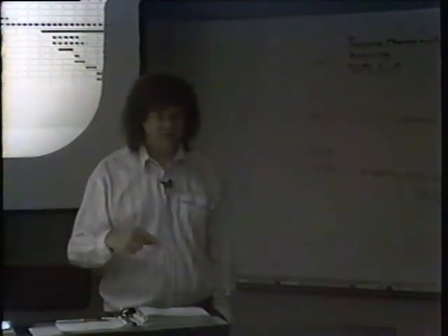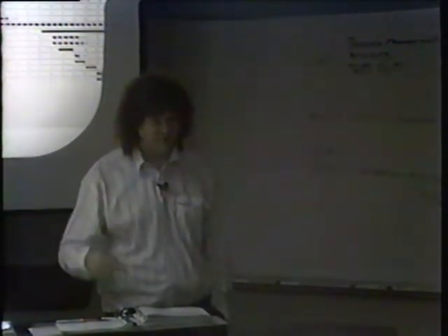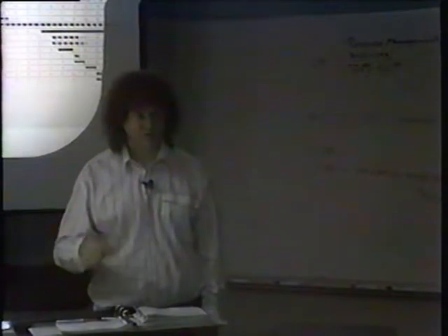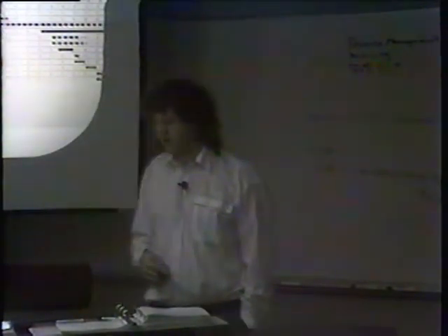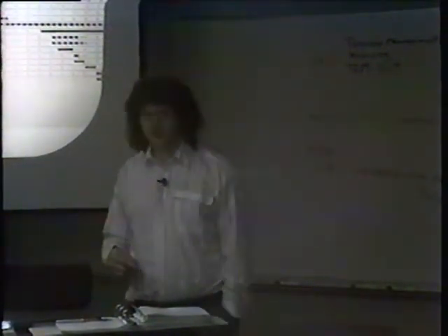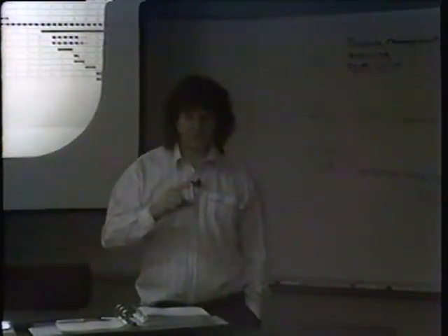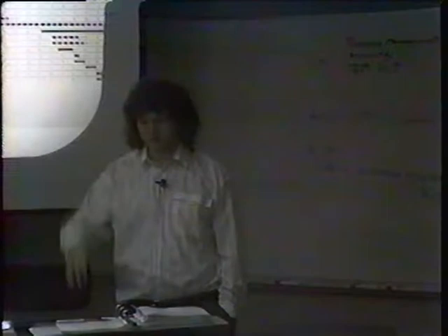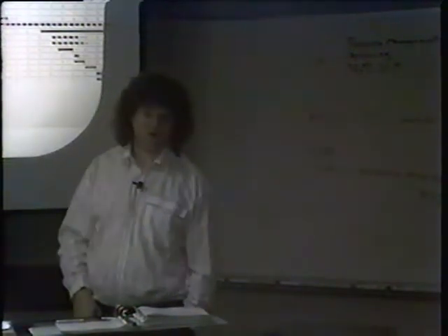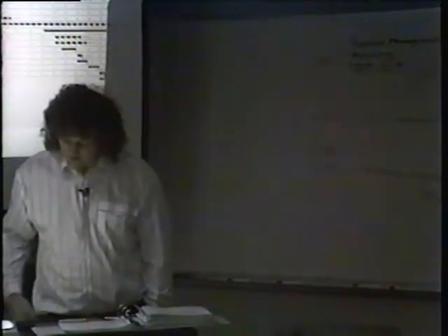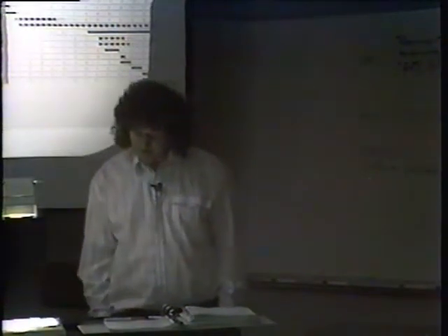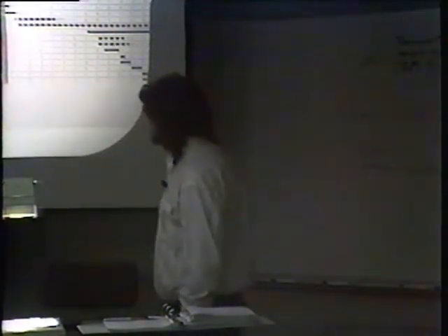But licensing can hold up the best of you. It's a real bureaucratic slowdown in everything, even if the code may be converted, getting licensing worked out on a third-party software package and things like that. One thing that will hold up a site is that one last application that a major number of people use, and it's somebody else's software outside of your shop.